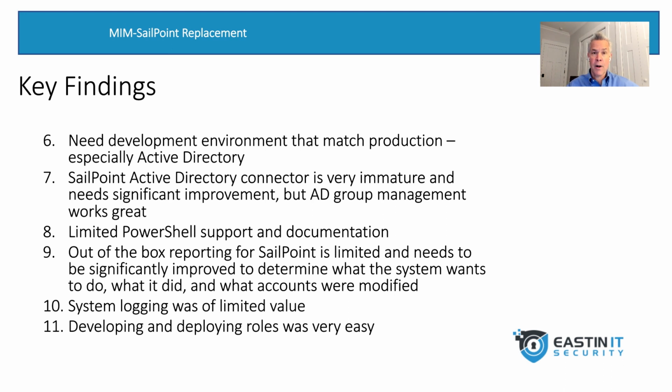We weren't involved in this problem, but the client was trying out some of the role features in production. They made a mistake, and long story short, they locked out access for a period of time to some key medical facilities in their environment. We were able to get it restored, but again, the lesson learned here is to get a development environment that matches production and do everything you possibly can in development before trying it out in prod.